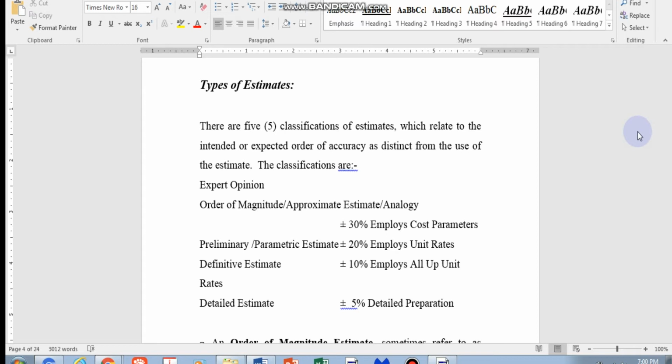So it's after the preliminary design. If your preliminary design is pretty sure, you could use definitive estimates, but again, most preliminary designs will not be so complete. So definitive estimates are used when the design is completed but it's still the pre-tender stage. It is a guideline for the client to see whether the contractor's quotation later on will be close to the definitive estimate.